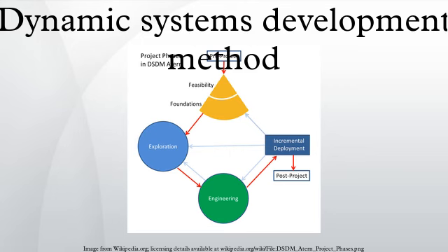Based on this prioritization, a development plan is constructed as a guideline for the rest of the project. An important project technique used in the development of this plan is time boxing. This technique is essential in realizing the goals of DSDM, namely being on time and on budget, guaranteeing the desired quality. A system architecture is another aid to guide the development of the IS.